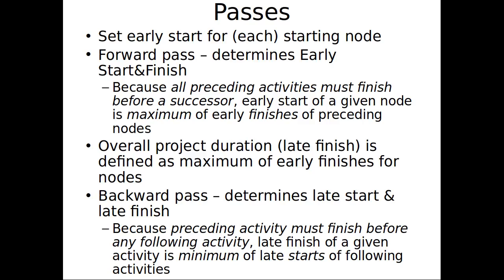Three differences in backwards and forwards pass. The backwards pass differs in that it's computing the late start and finish rather than the early start and finish as in a forwards pass. Difference one. Number two: in the forward pass, we first arrive at the early start and compute the early finish from that by adding the duration to it. Here, we're first computing the late finish and deriving the late start from that by subtracting the duration. That's the second way in which they differ.